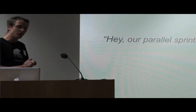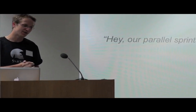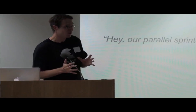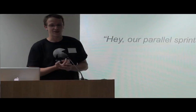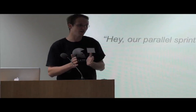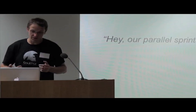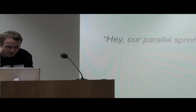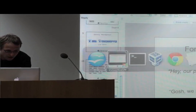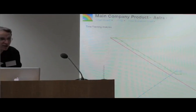So, one last small thing which we were not told, and which occurred after they started using this approach in production, was that parallel sprints were not so parallel because of logistical reasons. Because of shared Scrum Masters and so on, teams could start sprints as many as a few days earlier or later. And unfortunately, then the whole idea collapsed, because with GreenHopper and the Agile tab, your end date is just the end date. It has nothing to do with the team.